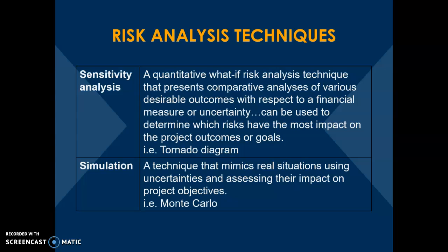If you perform a sensitivity analysis and you find that even if fuel costs go up or labor prices go up or these risks occur, the project will still be successful, in other words, make a profit, then you can be a lot more confident going forward. The alternative would be that a sensitivity analysis is performed and you find that even the slightest change in your predictions will mean that the project will lose money. That would be a very sensitive project, and the risk might not be worth taking. So the project might not go forward.